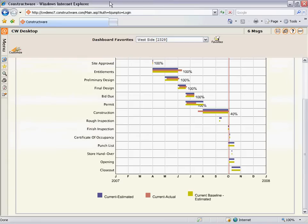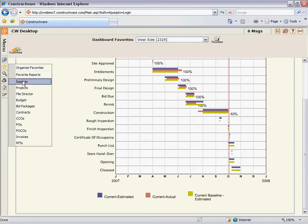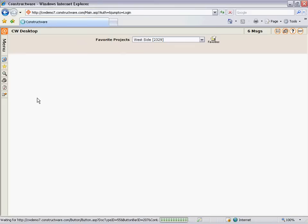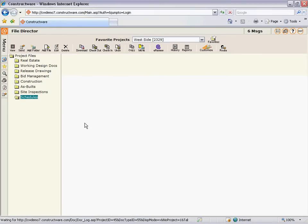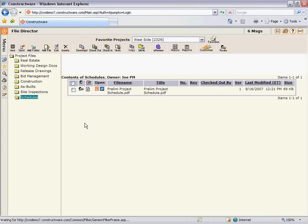When it comes to managing the actual construction project schedule, that is done using the file director. Typically, a schedule folder is created and permissions are set so that only the schedule owner can update this folder. Any time there is a new version of that schedule, it is posted to this folder.